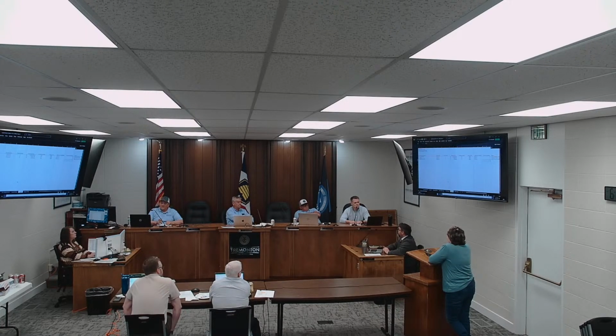In looking at municipal buildings and how much things cost, and I know this is ridiculous, and I can't believe that they really are, but they really are from multiple sources. It's about $400 to $500 a square foot, which just makes me want to throw up. But that's where we're all at. Not just all the rules, it's the construction costs and labor and everything is just